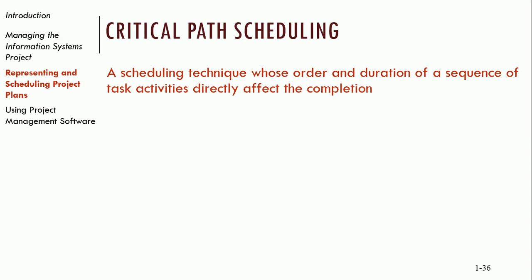There may be other things outside the critical path that could happen earlier or later without affecting the project. If you shift an entire sequence of non-critical tasks, it may not affect the rest of the project — you might be able to do something now or three weeks from now and it doesn't matter. But the critical path defines the main chain of dependent tasks that sets the absolute shortest completion time no matter what.